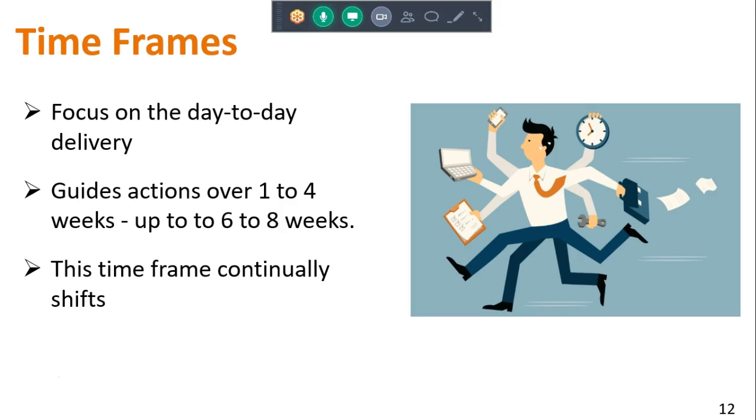One of the things that you should be mindful of in this is that you should be consistent about your time boxing. So you shouldn't be saying, well, this sprint or this particular iteration is only going to be 2 weeks long, but the next one is going to be 4 weeks long, and then we'll go back to 2 weeks, and then we've got a really short one that is going to be 1 week. That's not a recipe for a successful agile delivery. You should really be crafting a process that says we can always figure out how much work we can get done and how much work we can deliver in a consistent time frame.